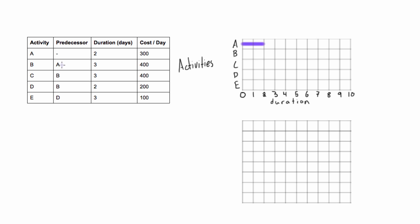Activity B depends on activity A and it's three days long. Activity C depends on B and is three days long. Activity D also depends on activity B and it's two days long. Activity E depends on D and it's three days long, taking us right to the end of the tenth day.